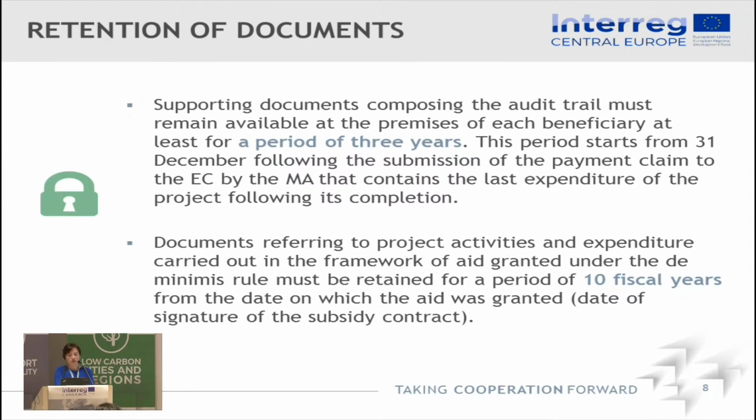You are obliged to keep those documents for a certain period. They must remain available at your institution for a period of 3 years. This period starts from 31st December, following the submission of the payment claim to the European Commission by the managing authority, that contains the last expenditure of your project after it is completed.